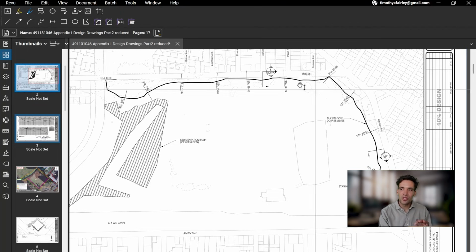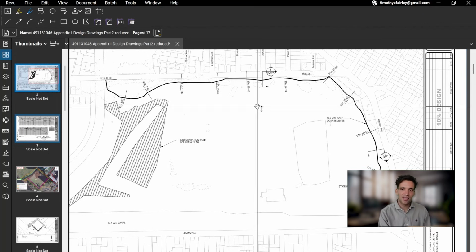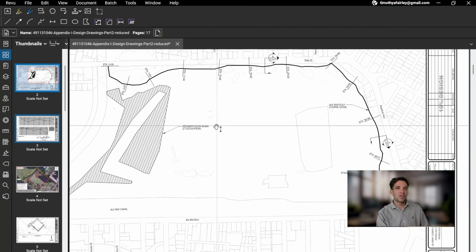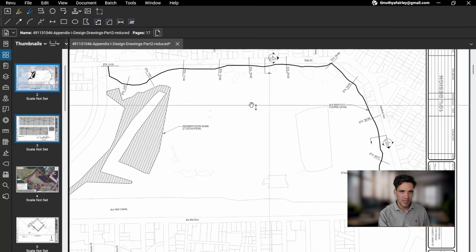The productivity with which you do this entire berm, if you can hit it at once and do the entire thing, versus having to break it up into stages. That's probably the big one for civil works, is just understanding the access you have to site and anything that is going to constrain your productivity.